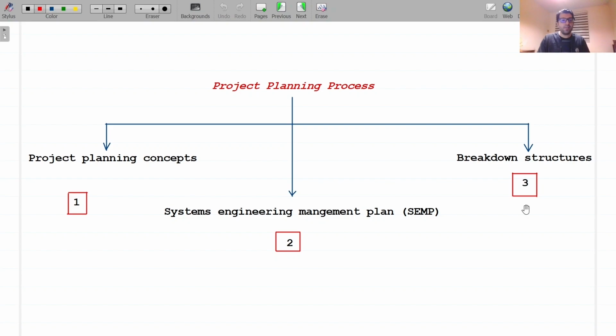A basis for configuration control once a particular project breakdown structure is baselined and a basis for effective management of changes. A framework to help identify risks and subsequent risk management. A basis for financial control and interface responsibilities resulting from business agreements.